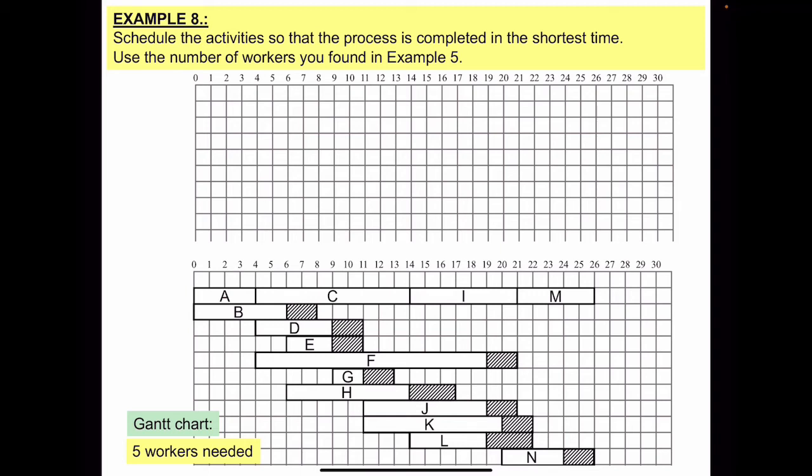The first thing you will do is to assign all critical activities to worker number 1. This is always the same, okay? So if you have critical activities, you give them to 1 worker because there doesn't have to be any waiting time. I mean, in reality, obviously, it doesn't mean that this person is going to work 26 hours, but it's one position, 1 worker is needed for that. 1 person is needed for that.